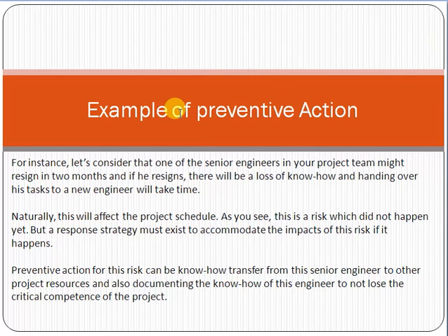For example, you are implementing a project, and you have to bring some hardware from outside the country. When you are reviewing the project timelines, you realize that if these hardware resources do not arrive at least 1 week before, you will not be able to meet the deadlines of the deliverable. So you talk with the vendor and push them to send the hardware at least 1 week before, so that you can meet the timelines or deadlines of the deliverable or the project.